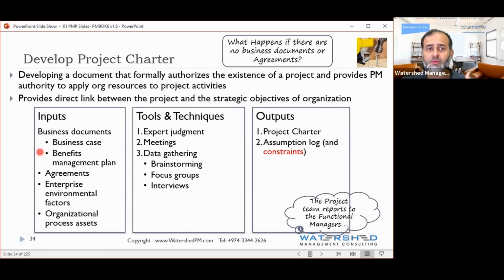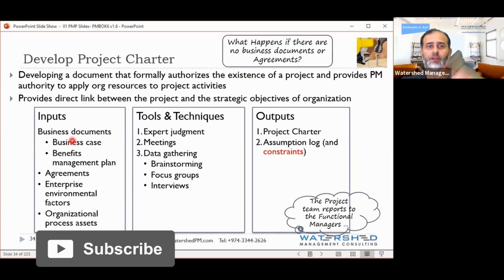So now you have some understanding that in some kind of big company, most of the internal projects, I'm using the word most, not all of them, and not all companies, may have a business case done before they approve the budget. And if you are the project manager of that project, which is approved, go find the business case, you're done with the charter. Move on.